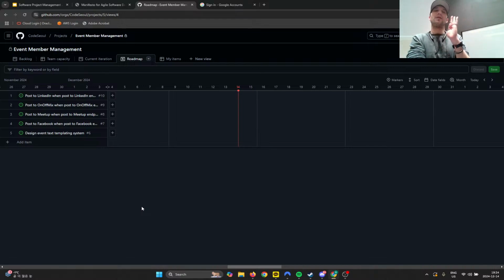Yeah. Just under one. So most project management systems, you can basically do that because they're disconnected from repositories, right? But they usually still have some kind of integration where you can connect them. So for example, with Jira, you can connect a board to one or more GitHub projects, and from a Jira issue, you can create a GitHub branch and say this is the branch to fulfill this issue, right? And then you can also have it so that when the issue gets merged or whatever, it can close the Jira issue, or vice versa, right? So these kinds of integrations exist in many different types of project management software. But yes, it is really cool that GitHub does that. It's going to be way better.